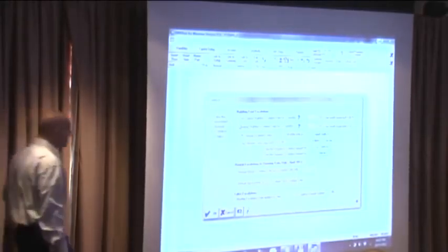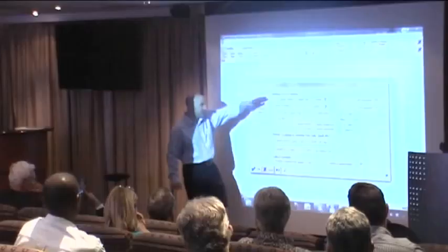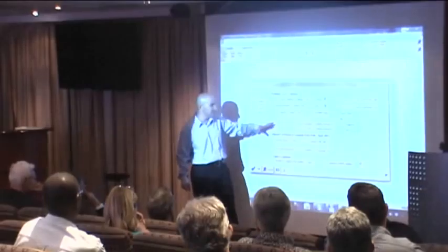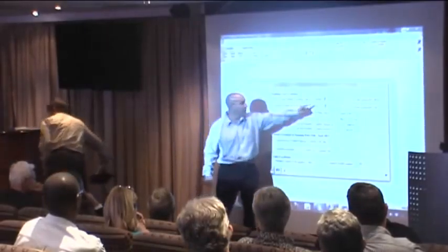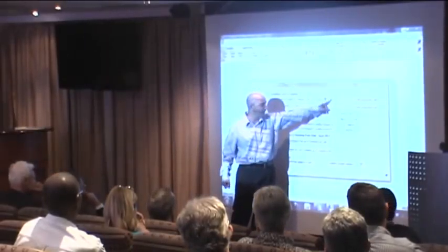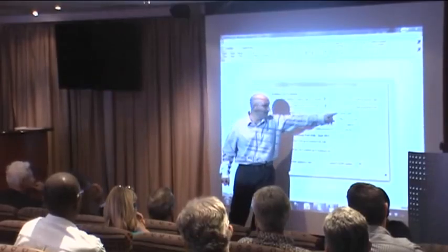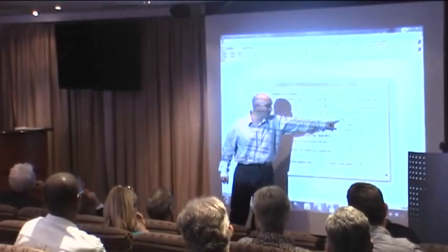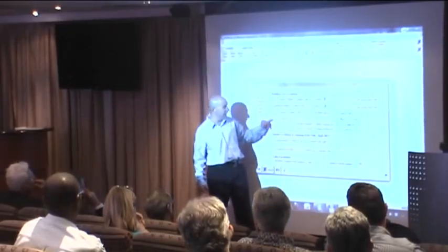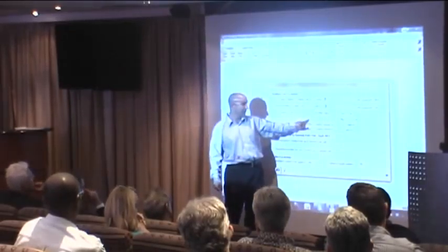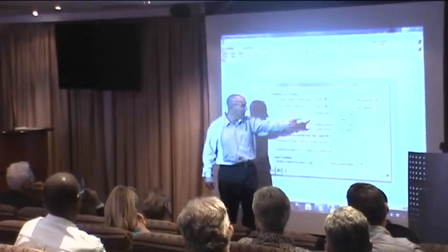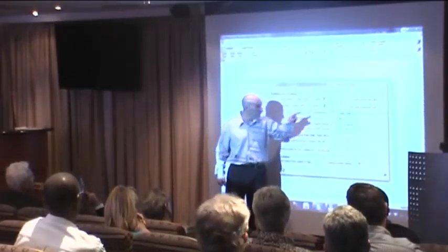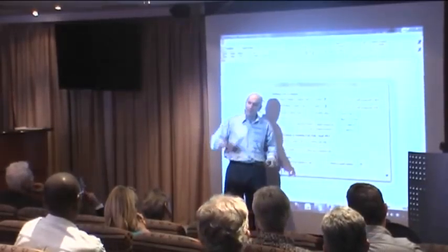It says to you, how do you want to deal with escalation? A lot of different options relating to escalation. Do you want to feed in a monthly rate? Do you want an annual rate? Do you want to use indices? Do you want to feed in your own sum of money? Do you want to apply your own cash flow factor? So you can say, I feel more comfortable with a cash flow factor of 0.55. You say, I want 0.55, you feed in 0.55, and it will adjust the S-curve accordingly.